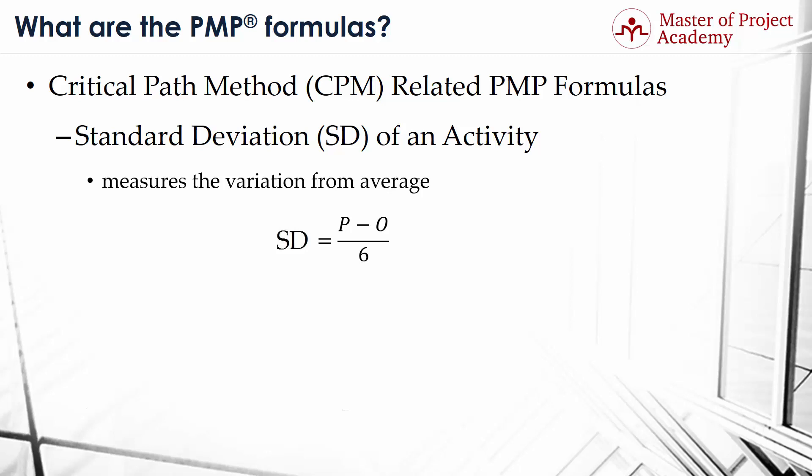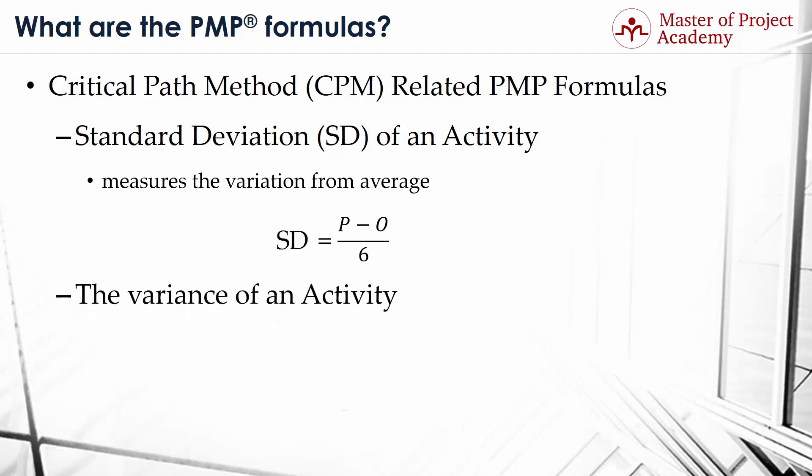The Variance of an Activity. We use this formula result as an indicator of activity risk level, which prompts the course of action to take. Activity variance calculation involves taking the square of activity standard deviation. So, the variance is the result of P minus O, all divided by 6, and then to the power of 2.